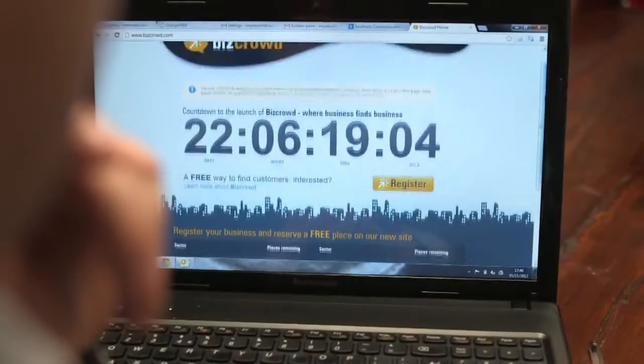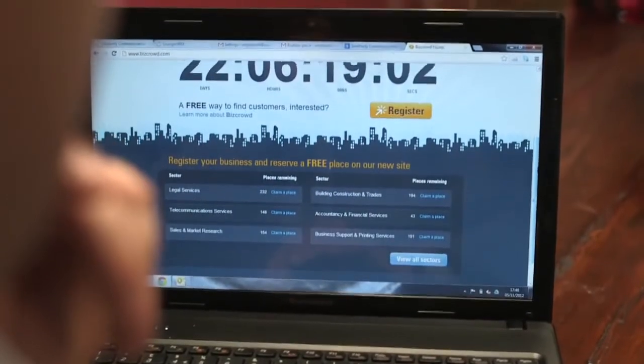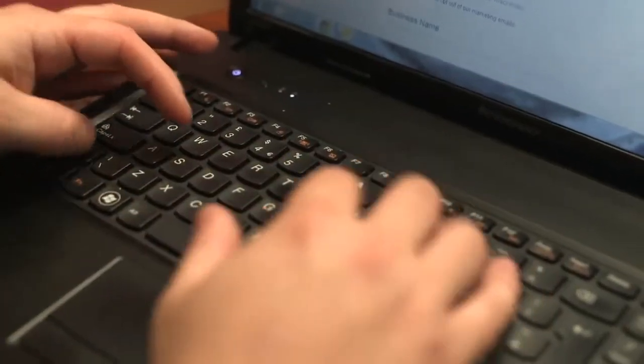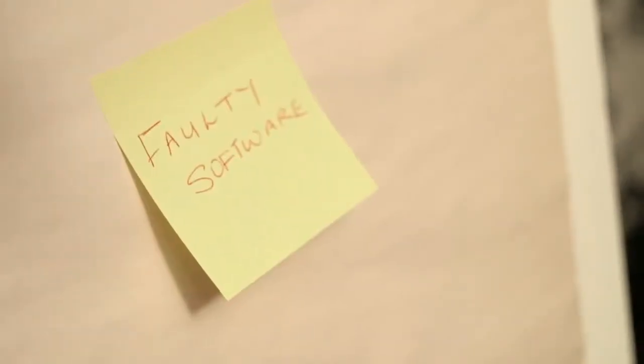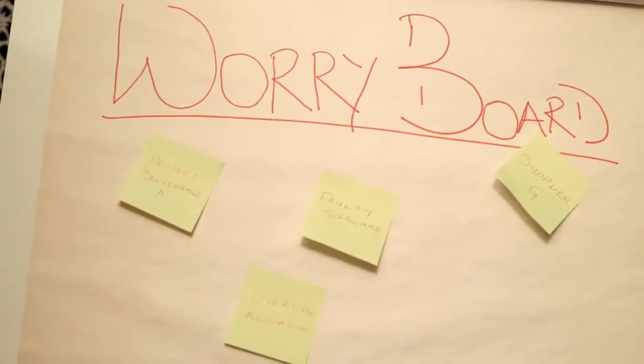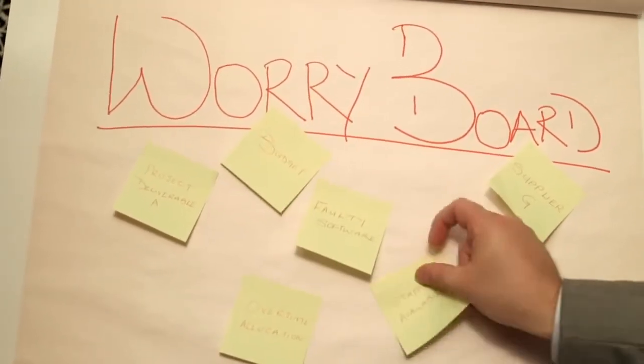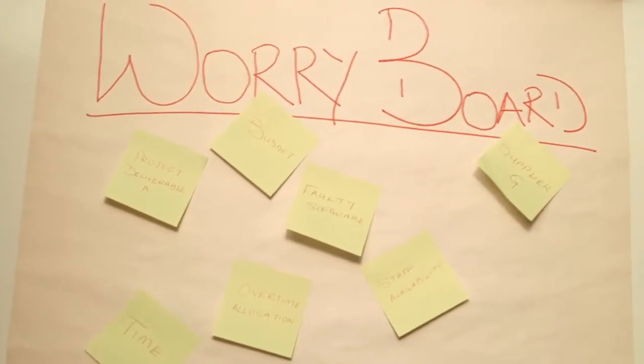Be flexible. Don't assume everything will go to plan straight away. Most projects will get hit by a risk or issue which will require additional investment, so it's important to have a contingency plan in place. For all my projects, we place any worries we have about the project on a board and address these worries as a team at the beginning of each week. It's incredibly visual and hands-on, and it helps you approach the project proactively rather than reactively.